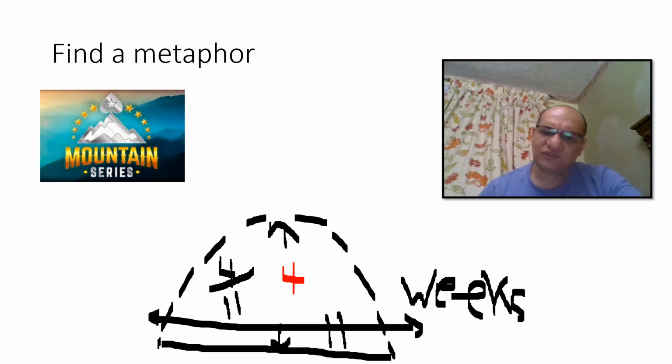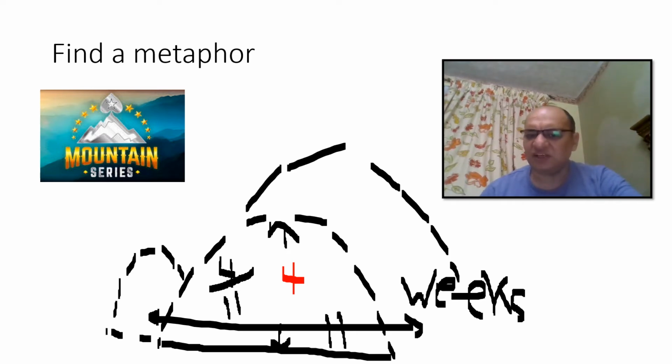What about the rest of the tasks? They will be added on top of this one or beside it, according to when they start and end. So we end up with a mountain series. This enables us to see many good trends, like empty spaces or dense areas, or whether the distribution of the tasks is not a normal distribution, so the S-curve will be deformed. The values show where the maximum is, whether in the middle or not. This is very good, and this is what we target in our visualization. So let's proceed.